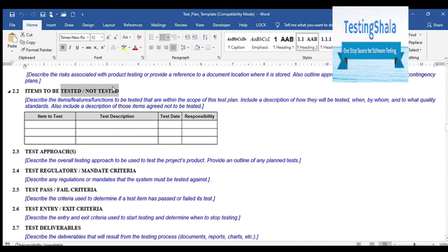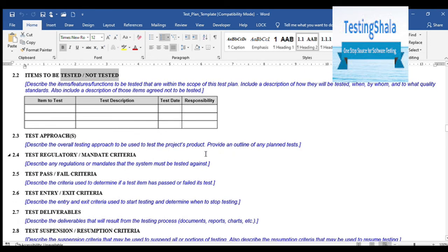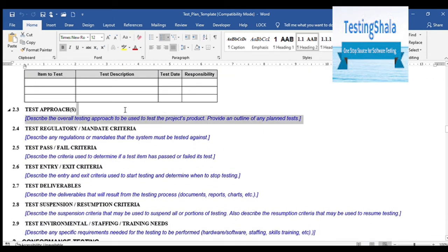Items to be tested and not to be tested is essentially your scope — what is in scope and what is out of scope. You will clearly call out what you are going to test and what you are not going to test, and you will take a sign-off from the leadership team. If something called out as out of scope later comes back into scope, you will need to raise a change request. You must be transparent about what is testable and what is not.